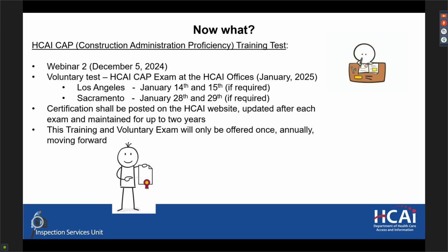Thank you. A question asks, can you provide more clarification about ACD versus NMA? So if I may, the simple way to consider the difference between the two of them. First of all, keep in mind both basically are a modification in the drawings. But the difference between NMA and ACD is the NMA, as the acronym says, is non-material alteration, which means there is nothing that can interfere with the code. And ACD is an alteration of the code. And so that needs to be approved by HCI as a legit change order.